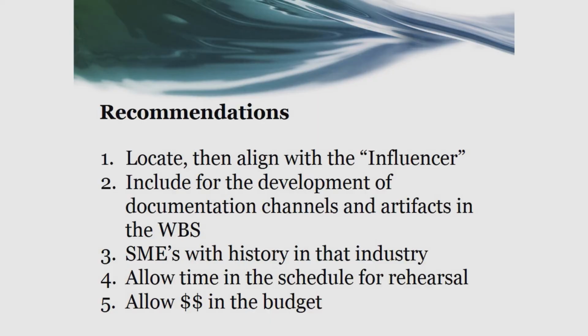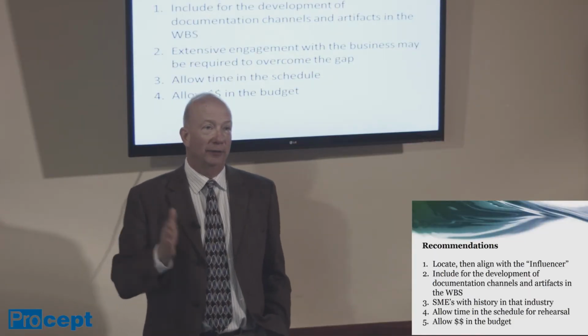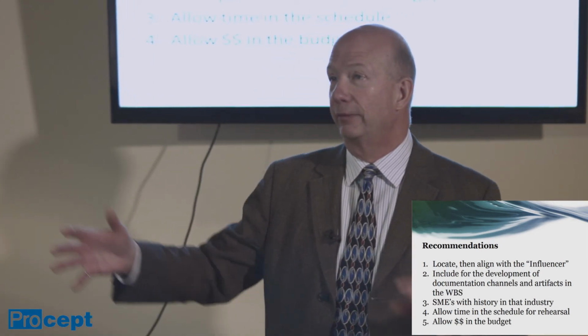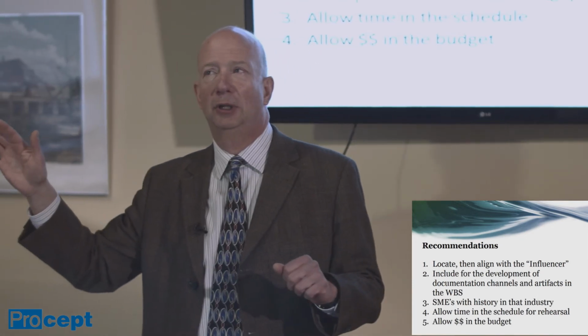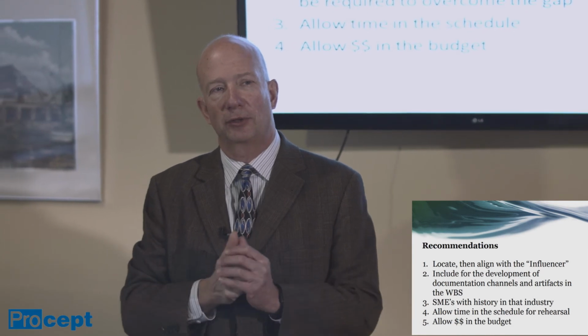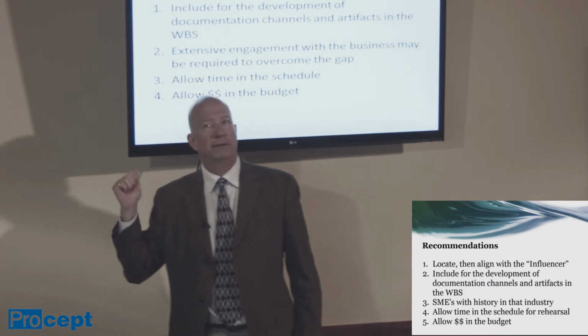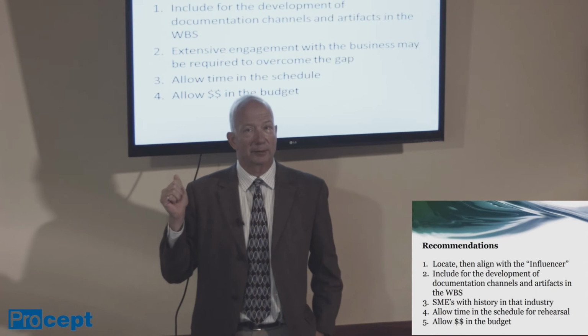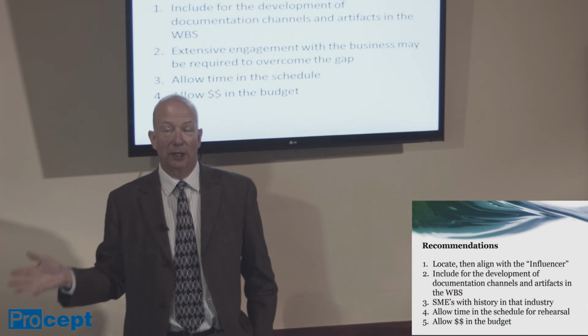So what do we do? We include for the development of documentation channels and artifacts, I call them. And those will be organization specific. It's really, really hard if we have joint ventures. Metrolinx, anybody here from Metrolinx? People that are working maybe on large government IT upgrades, those sorts of things, where it's multiple organizations, they have to work together. You have to actually develop those standards, and it's a huge risk if one doesn't acknowledge that. Allow time and money.